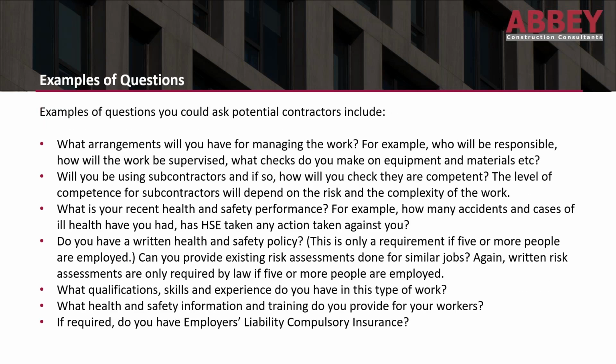So what are some of the questions you would need to ask potential contractors? For instance, what arrangements will you have for managing the work? Who will be responsible for that work, and how will it be supervised? What checks do you make on equipment and materials? Will the contractors be using any subcontractors? And if so, how will they be checking that their subcontractors are competent? What's the level of competence for subcontractors? And that will depend on the risk and complexity of the work, as we've already said.